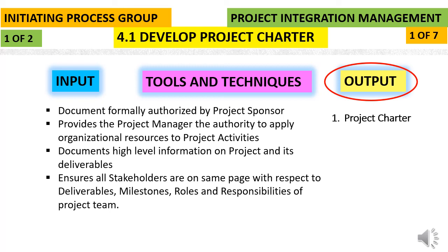So the project charter is a document which is authored by the project initiator and authorized by the project sponsor, which ensures the existence of the project, and also it will give an authority for the project manager to apply the organizational resources to project activities. So it is like a visa or a work permit.